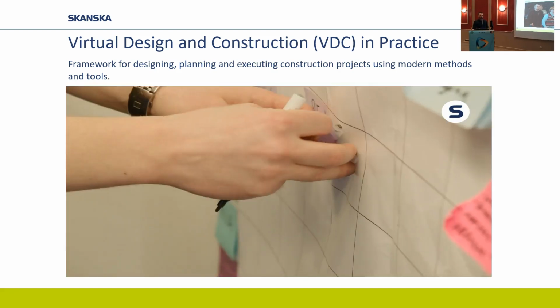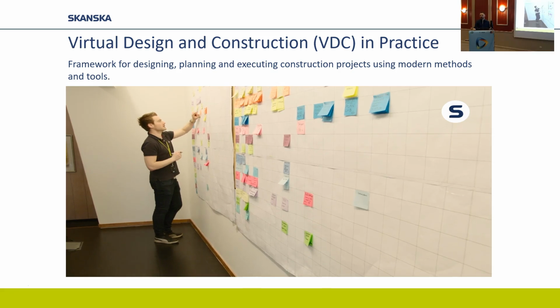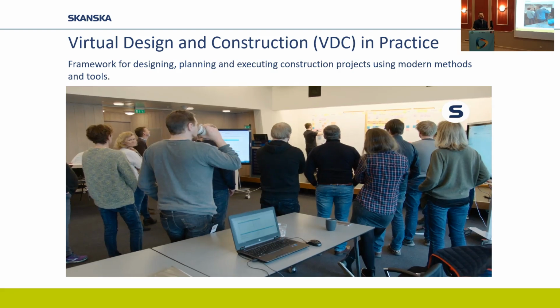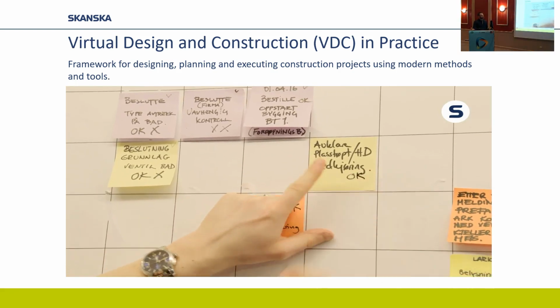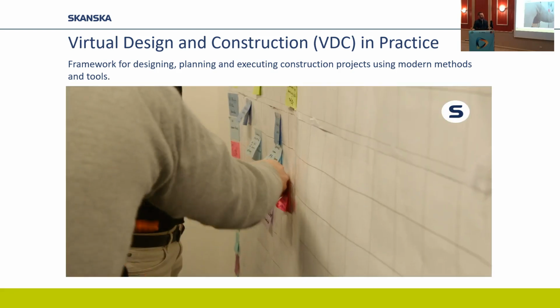ICE sessions are not regular meetings. When people come to meetings, they think we're going to sit there, drink coffee, and discuss all the things we should have been doing. ICE sessions are active problem-solving sessions. We start with the plan. Actually, we start with safety. We always start with safety. But the first action item is the plan.